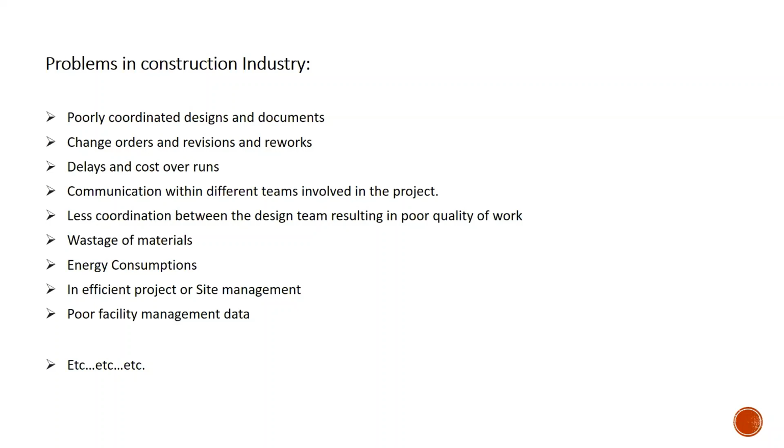Change orders, revisions and reworks: due to this lack of coordination, we will be getting these change orders, revisions, and updating of these revisions and rework. It will take a lot of time. That will lead to delays, cost overruns, all those things. And proper communication is another issue.